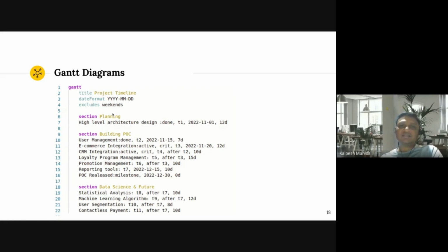We can specify the time formats we want. If we would like to exclude some days, we can define weekdays, or even comma separated values if we would like to specifically exclude, let's say, Sunday. If we are working on Saturday, but if we are not working on Saturday, weekends are good settings for us.